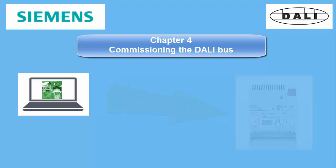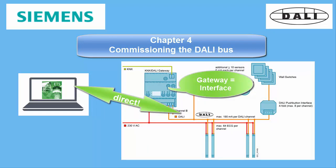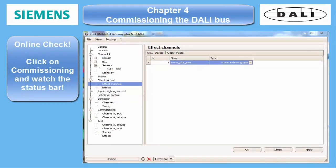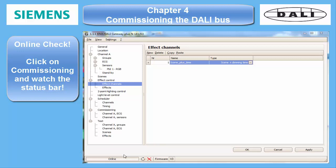The reason? The live commissioning tool builds up a serial communication to the DALI Bus devices through the DALI Gateway, but does not program the Gateway itself. So when we open this page, we must check if it really goes online. Only in this case it is possible to carry out the following procedures.